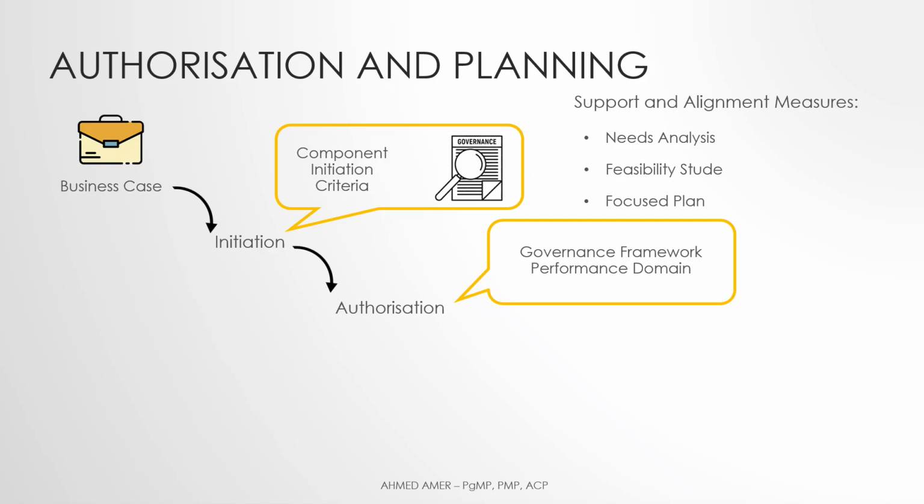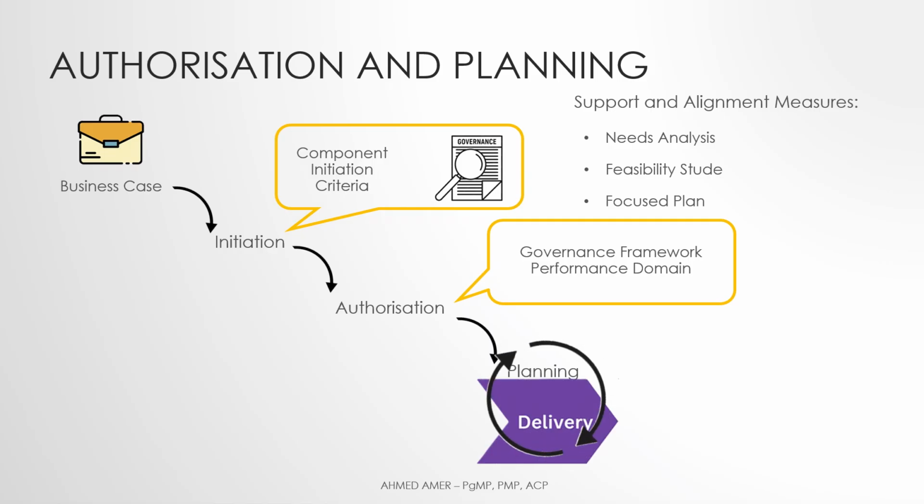Be mindful that component planning is performed throughout the duration of the program delivery phase. This is due to events that require significant replanning or even new component initiation requests. Component planning here includes the required steps to integrate the component into the program.